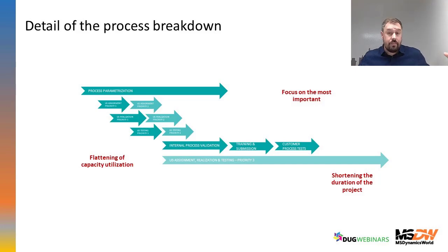So the project is usually planned longer, but if you use this type of planning, you can tell every hand will work on this project, and everybody will in this sprint work on priority one and priority one tasks of these two processes, and just now I'm shortening the project because every hand is focused to work on this project.